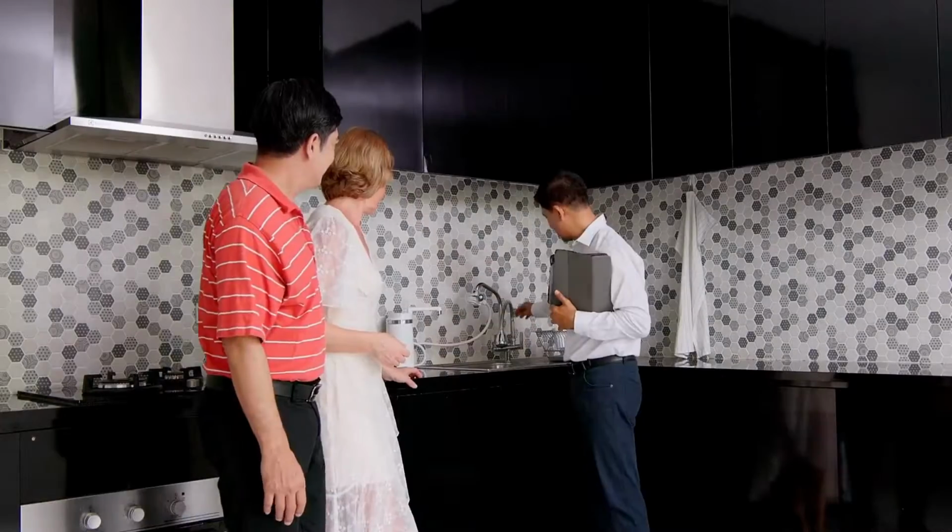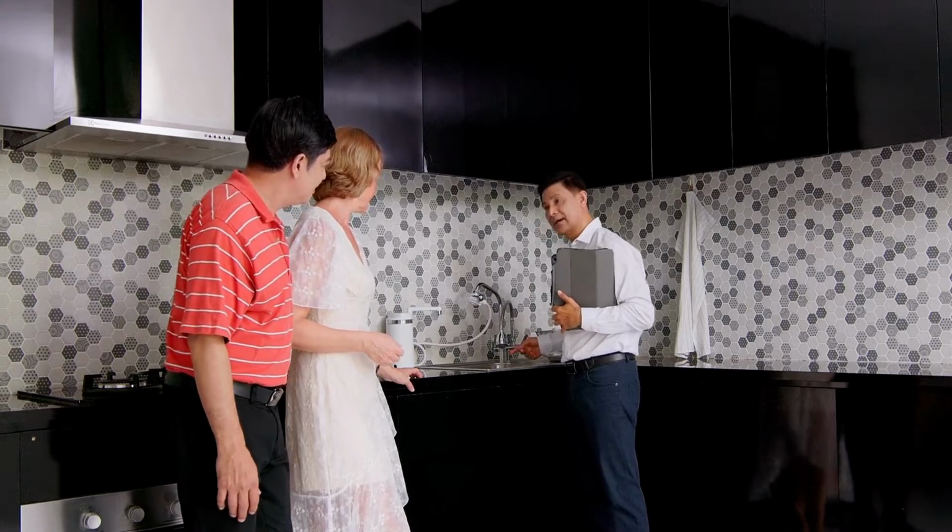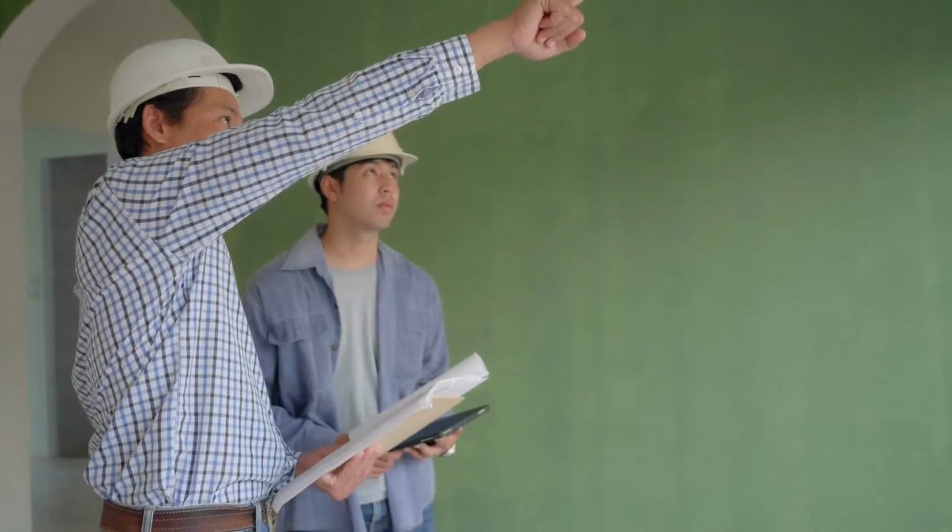Within a week or so of the final closing date, the builder will ask you to come do a final walkthrough of the new home. At this point, the home is basically completed, so this is your chance to see the final product and check the builder's work. During this appointment, you and your agent will inspect each room of the house along with the builder's rep. They call these walkthroughs blue tape walkthroughs, since the buyer will do the inspection with a blue roll of tape handy, and then mark any item they find with a blue piece of tape so the builder knows what to address.